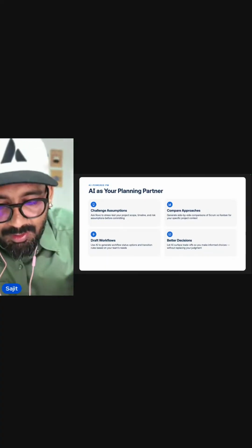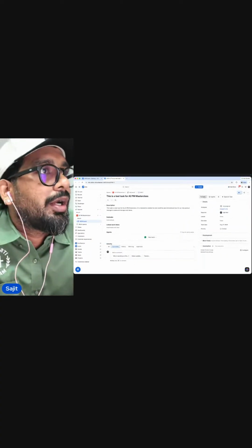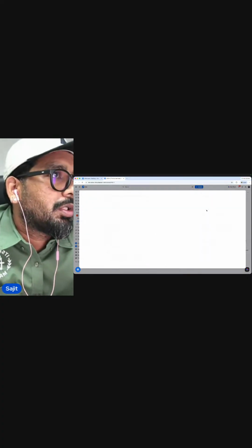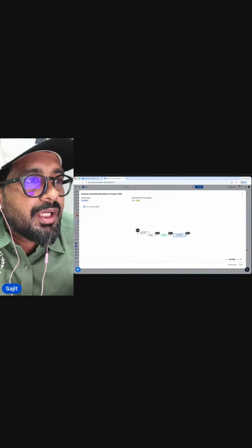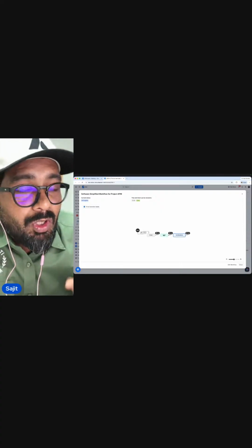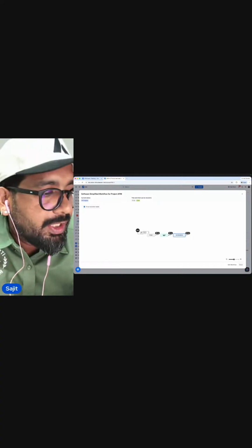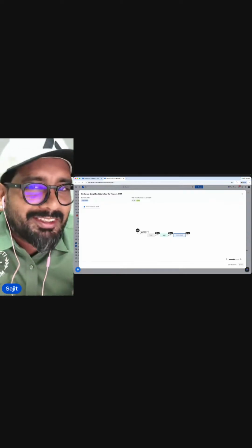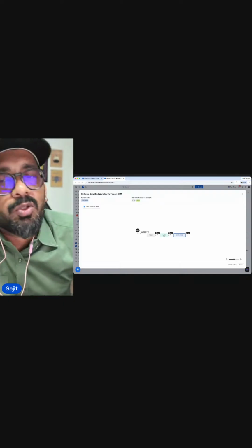Let's take an example. Let's go back to Jira and see what we're talking about. All right. Let's say this specific task goes to in progress. Now, let's look at workflow. Now, what we are saying is, let's say, for example, if it needs to go from in progress, which is the current status, to done, I want a specific person's approval. I want a rule that only a person in the project manager role or the QA role, let's be more realistic, only the people in the QA role should be able to move a specific ticket to done.